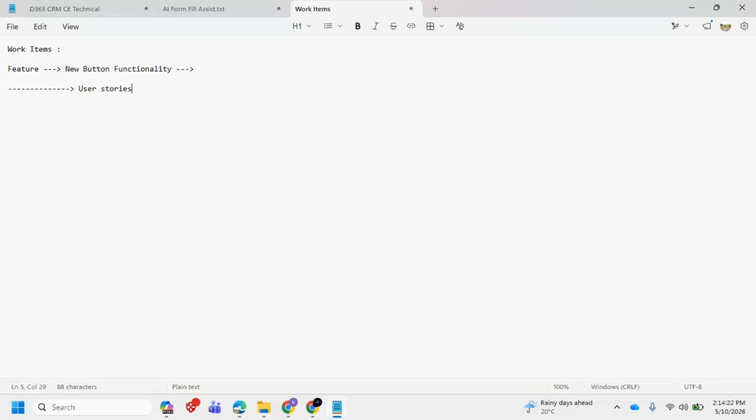A feature is a simple task. Simple means a single task, kind of implementing a new implementation. But in general, if you want to implement any integration, you have to divide that integration into 3 or 4 types, right? Like creating the schema, creating the .NET files, creating the integration endpoint, like that, so many. So under a single feature you will have user stories.